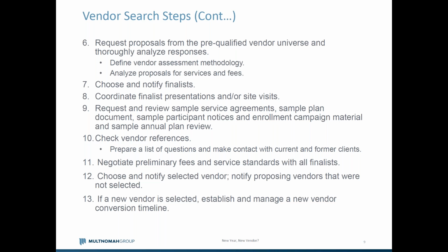It's important, as you bring in vendors for finalist presentations, that they're provided a very structured agenda of what it is that you want them to address and accomplish. If that structure is not there, a lot of times you'll get a sales presentation that doesn't really add a great deal of value in terms of your evaluation of them. So trying to be very structured and communicate proactively what you're hoping they accomplish during a finals presentation is important.